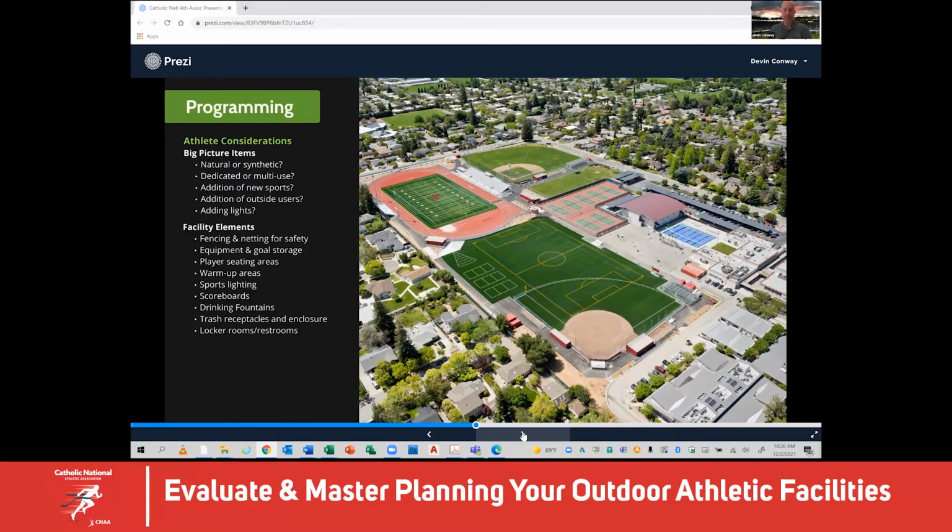A lot of these elements can be inconsequential in the scheme of a site layout, but a drinking fountain at a stadium might be a $3,500 product, but it costs $25,000 to get a water line and a waste line to it. So, knowing that and planning for it so you have an accurate cost estimate is important. It's important for you to tell us these are all the needs. Let us then tell you how best to plan for the development and implementation of those elements. So the more you tell us, the better.